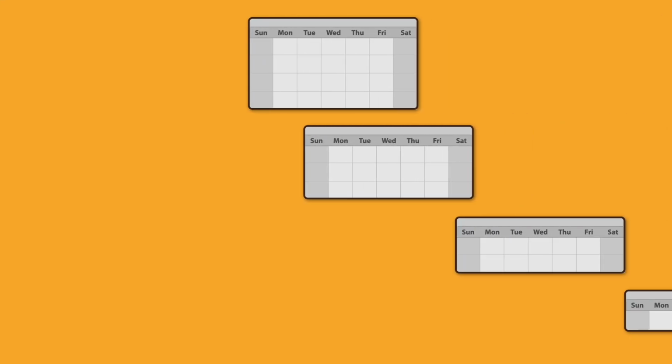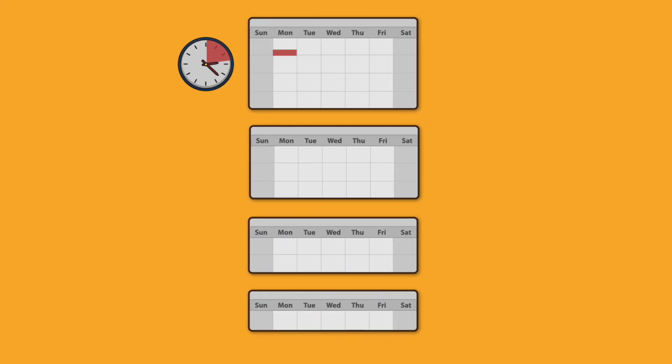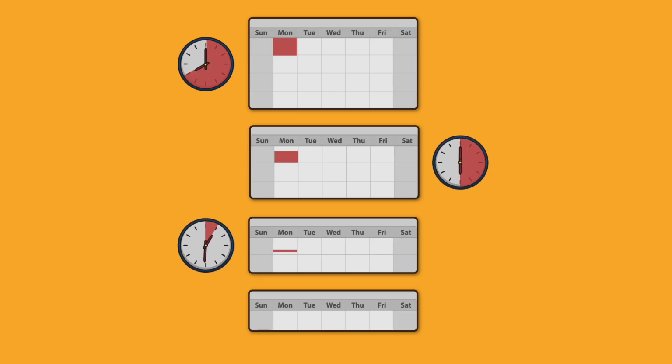The official time box for a 4-week sprint is 8 hours. It's progressively shorter for teams doing shorter sprints, down to 2 hours for a team doing 1-week sprints. I think these are reasonable time boxes or limits for a team that is new to Scrum. For experienced teams, I recommend targeting 45 minutes per week of sprint duration. That means 90 minutes to plan a 2-week sprint and 3 hours to plan a 4-week sprint.